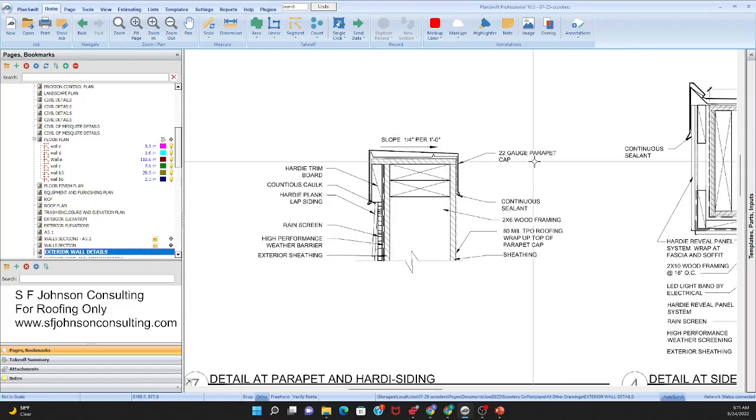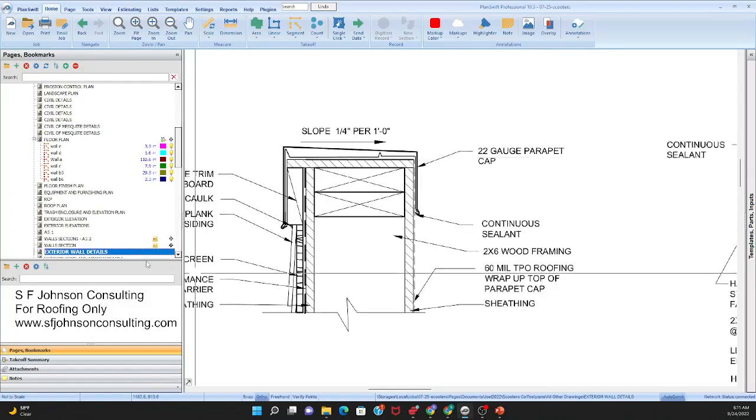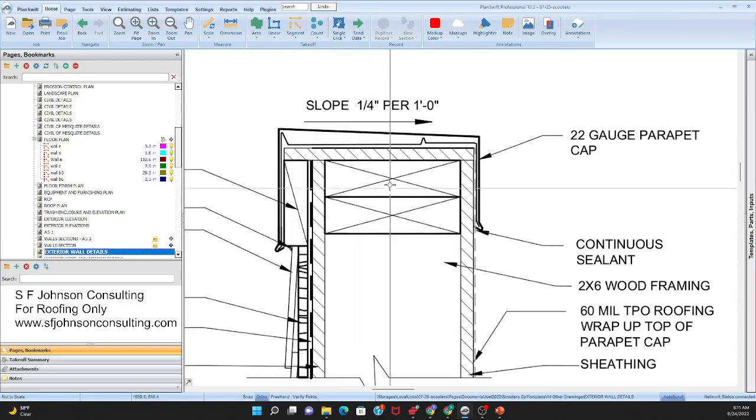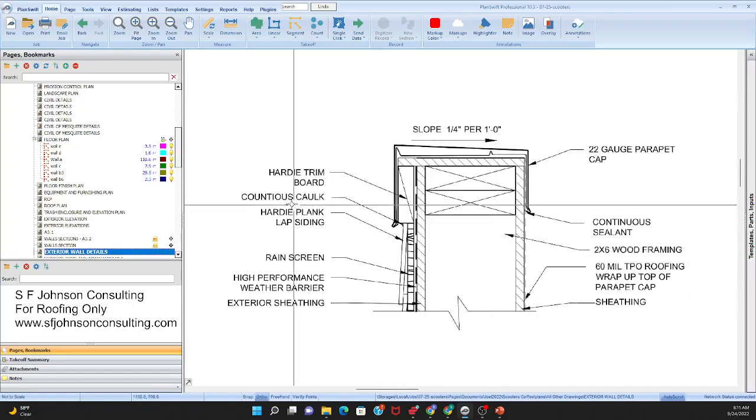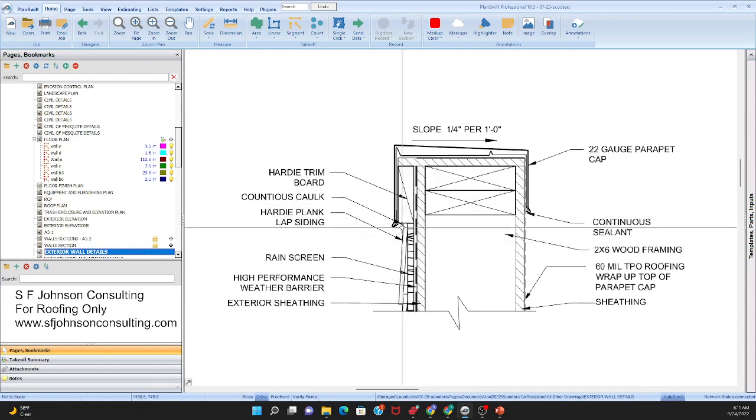So I have to go to every view. And now I know that, because I'm looking at the plan for my takeoff, even for the rough carpenter, I have 2 of these top plates. So 2 times the perimeter of the roof, if I'm doing my takeoff for that. I know I have the sealant, continuous caulking, so I know how many linear feet of caulk I have. So I know from the container how many linear feet of caulking, 8 ounce, 16 ounce, 32, a bucket, whatever, so that I can do a proper takeoff to do a proper material cost determination, right?